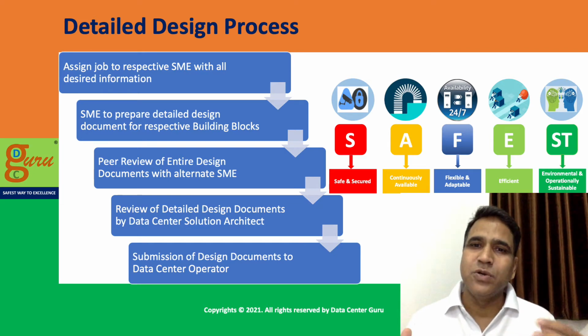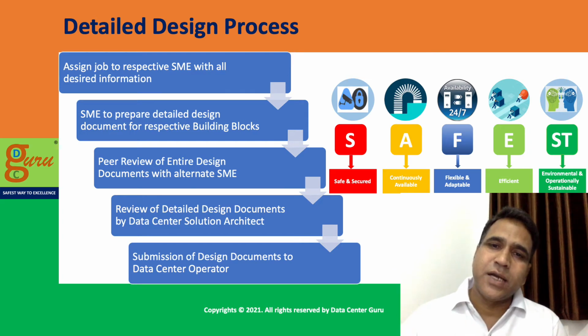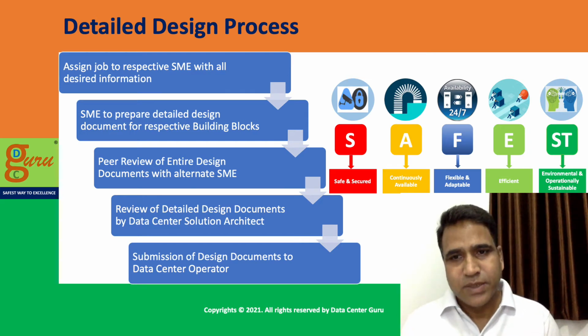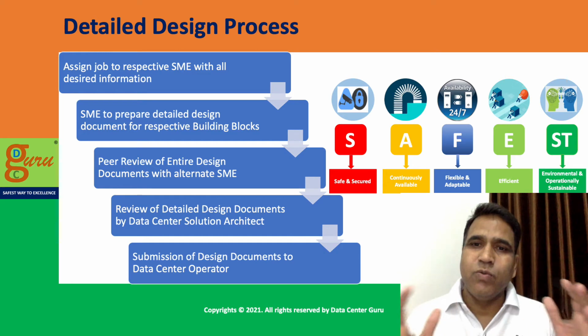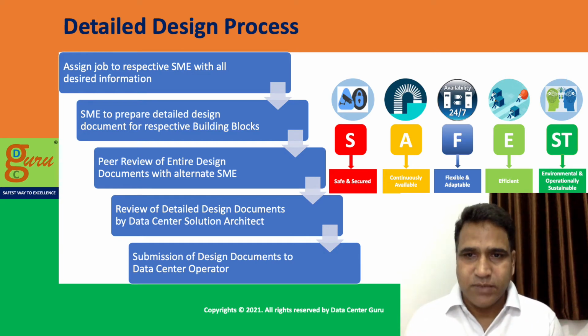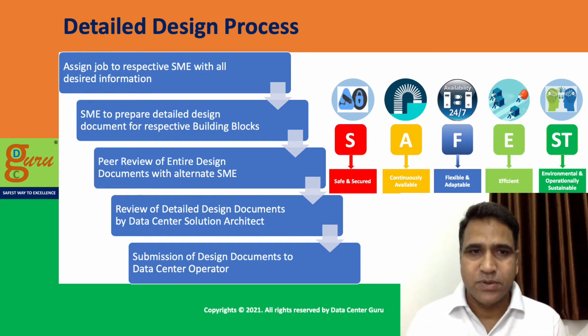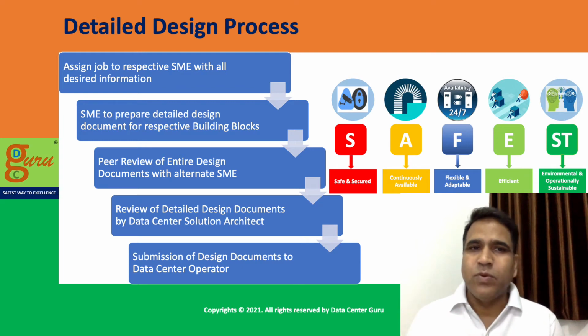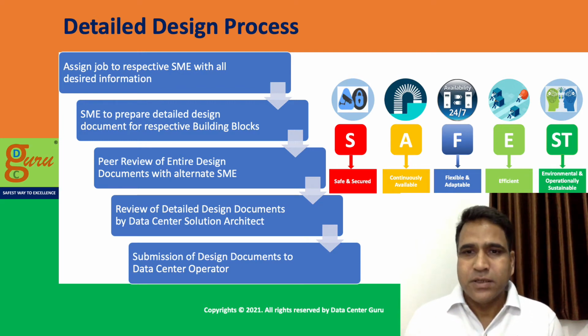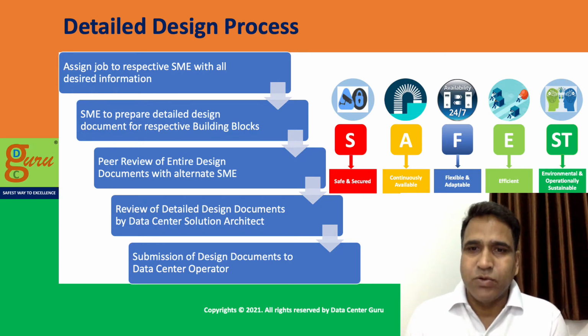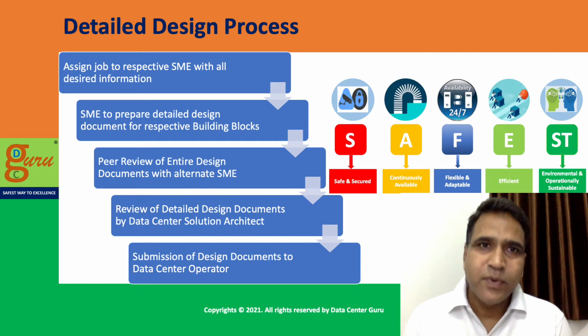He has to make sure that whatever detailed design is done by the respective SMEs meets the overall design objectives and there is no gap in it. And once the entire thing is done, the entire design documents have to be submitted to the desired stakeholder who owns it.